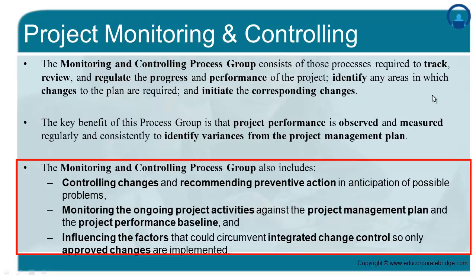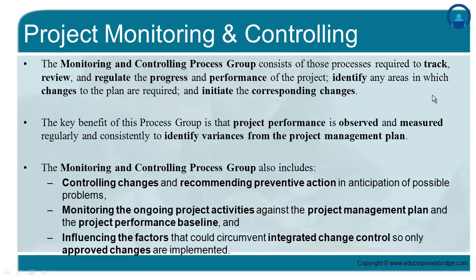When you suggest that certain changes are required to the project management plan and its subsidiary plans, you raise a change request. That change request goes through integrated change control, where an impact analysis is done. The change control board will either approve or reject that particular change request, and only the approved change request will be taken up for implementation. As per the approved change request, the corresponding changes will be made to the appropriate project management plans and taken up for execution.